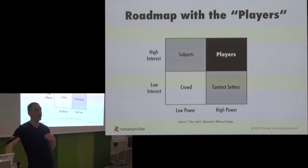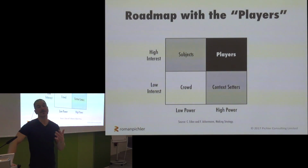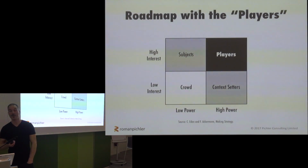So one of my clients really experienced that, where development, the Agile started in development and then spread to product management, and then they hit the next bottleneck, and that was really marketing. And marketing couldn't support all those releases that the organization had started to pump out, right? And so it's important to understand that. It's important to know that you've got an actionable, realistic product roadmap.